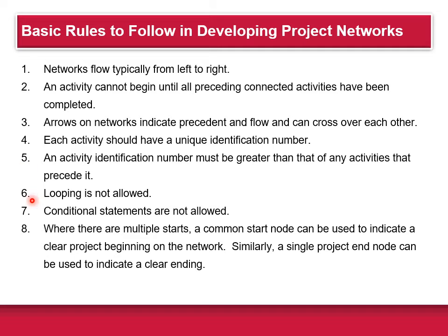Looping is not allowed. Conditional statements are not allowed. Where there are multiple starts, a common start node can be used to indicate a clear project beginning on the network. Similarly, a single project end node can be used to indicate a clear ending.